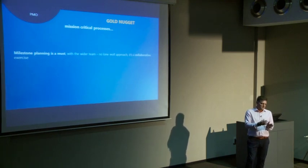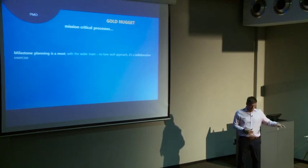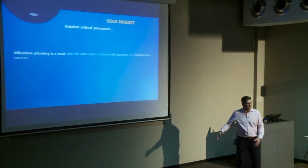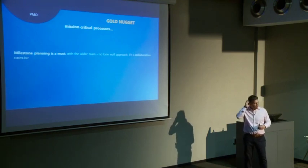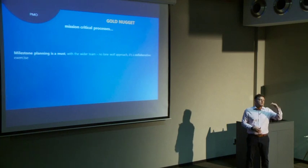That helps the project managers as well. Although they have most of the input into creating milestones for strategic projects, it helps them commit, almost, to say these are the deliverables of the project. I can do this in 6 months, I can do that in 3 weeks. From there, the milestones are built up for every one of these strategic projects. The project managers do the milestone planning with the PMO, but the PMO cannot manage the actual tasks and activities in between those milestones. It's pointless. We'll never get that amount of information aggregated up to a PMO, and that's also something we wanted to avoid. We don't want to be the kind of PMO that forces project managers to report minute detail up to a PMO.